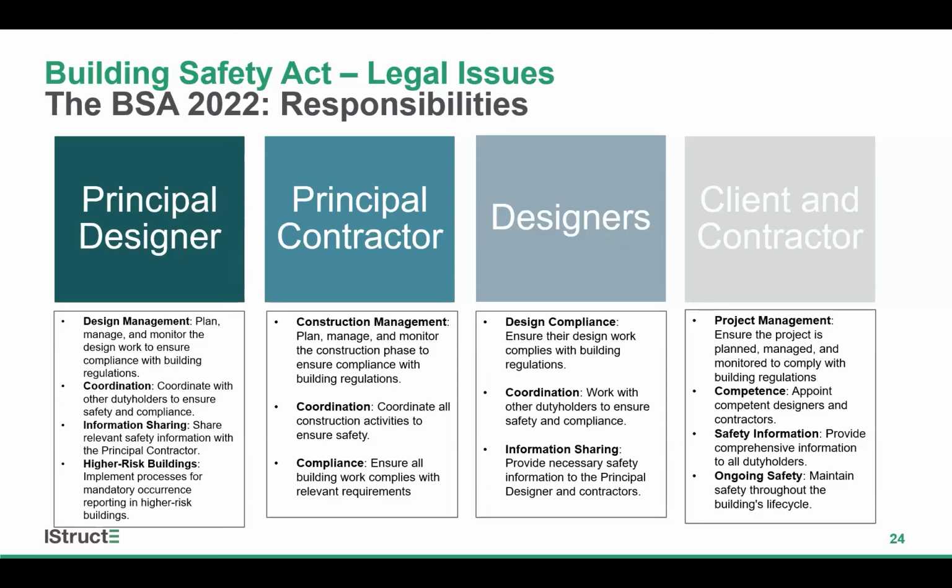Record keeping will be an essential component to demonstrating compliance. And to my mind, you're going to need to approach projects with a mindset of looking ahead and asking yourselves, could we prove and demonstrate our compliance with our obligations if asked to do so in, say, 12 months' time, or 2 years' time, or 15 years' time? And so record keeping is going to be key, and keeping records for longer is going to be important.